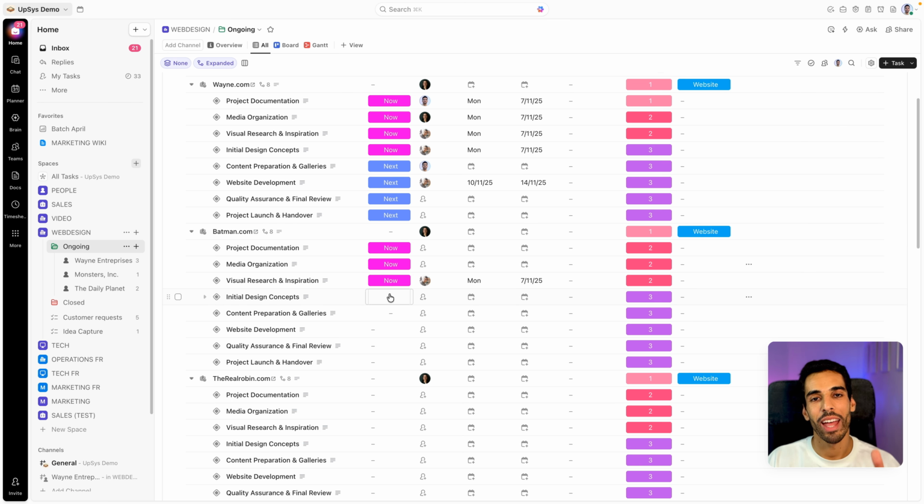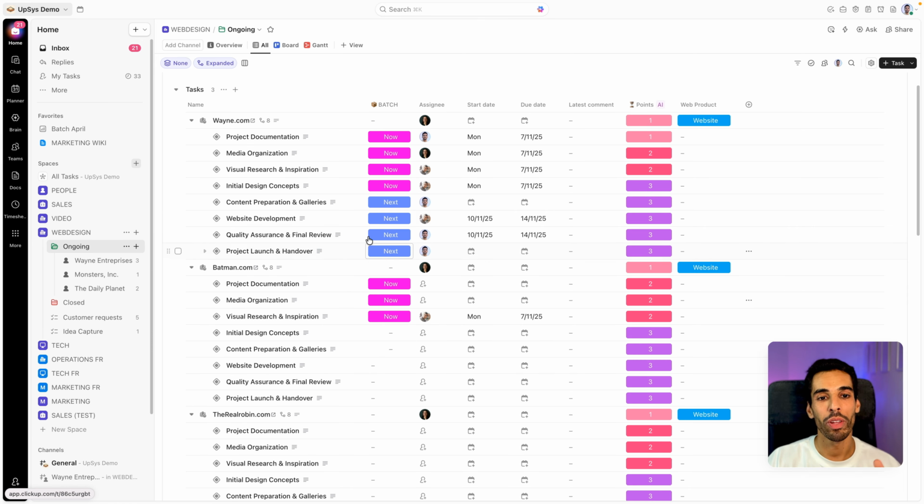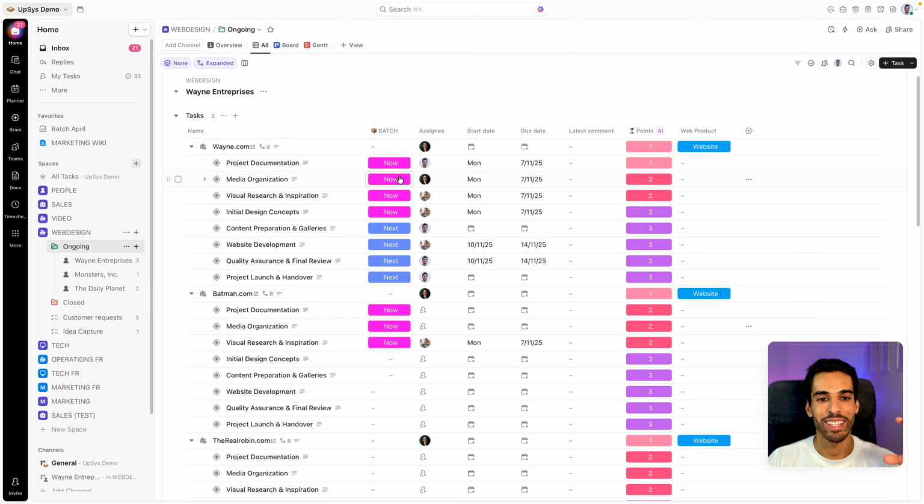Obviously, you can have that done manually, but you can also decide to create a template and to pre-frame your project in batches of weeks, for example. And as soon as you fire a new project, say you're starting a new project from a task template, you can have that taken care of by the agent. They will take care of assigning the tasks, setting the start dates, setting the due dates for you, and you will not have to do a thing but to watch at your workload view that we'll see later.